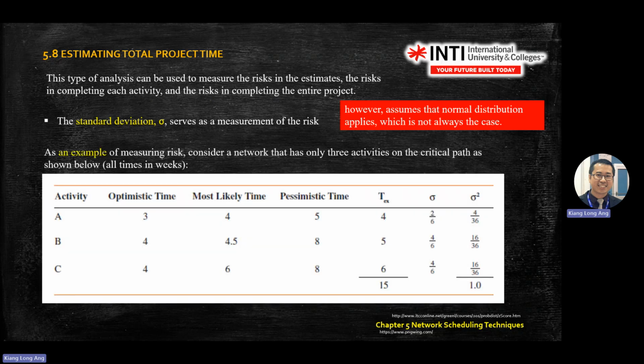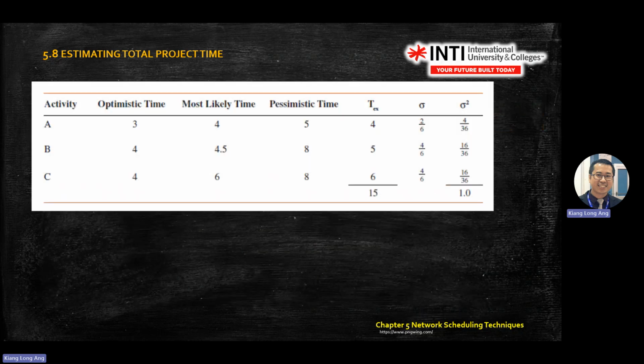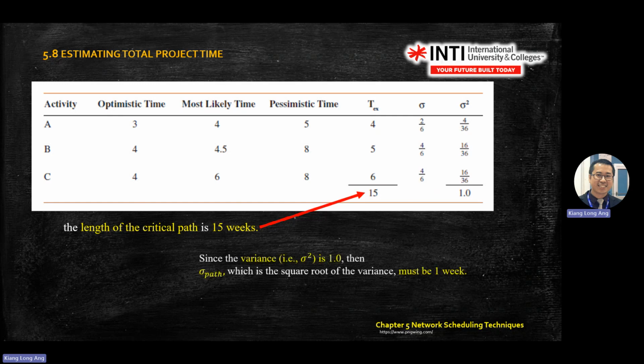Okay, so this is the example that you have been going through using A, M, and B values. So when you see these 3 values, most of the time you need to find the mean number, and from the mean number you can find the standard variation and the variance.